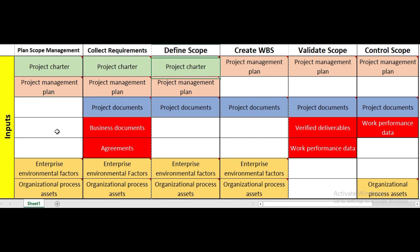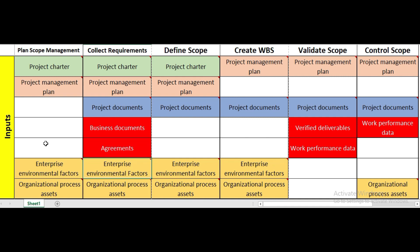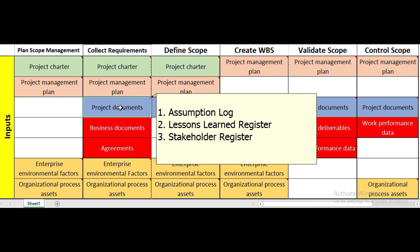For collect requirements, the inputs are: project charter, project management plan, project documents, business documents, agreements, enterprise environmental factors, and organizational process assets. The distinct new inputs here are project documents, which include the assumption log, lessons learned register, and stakeholder register.